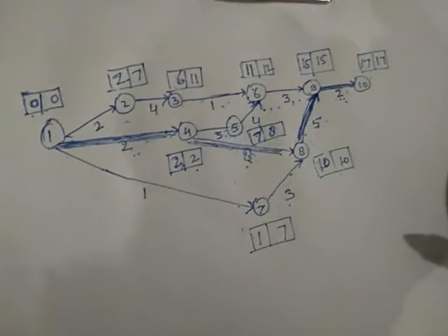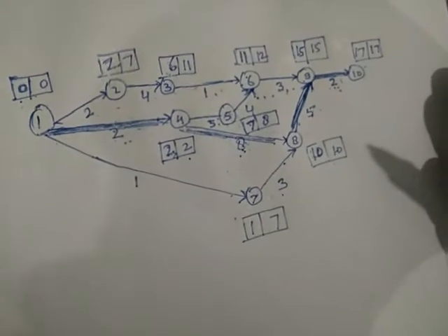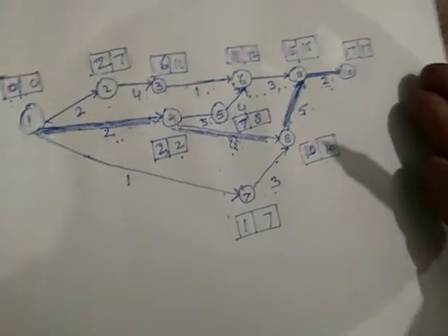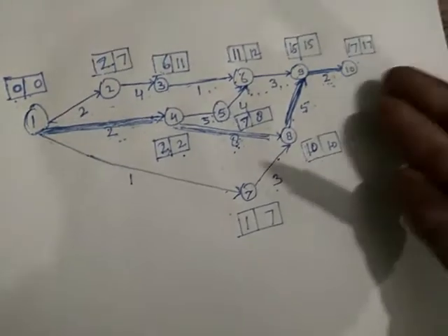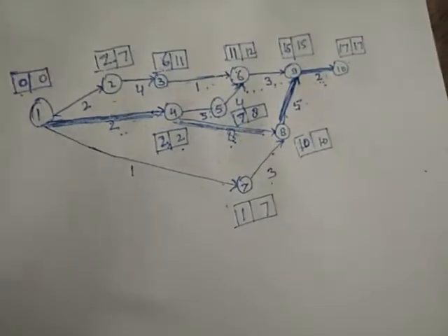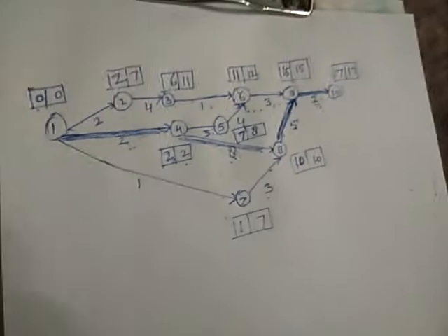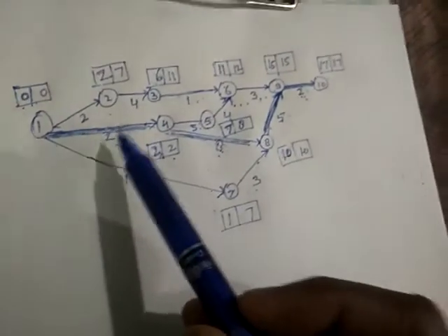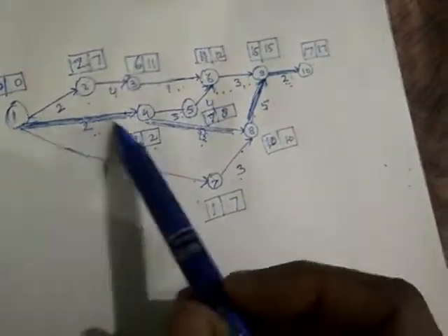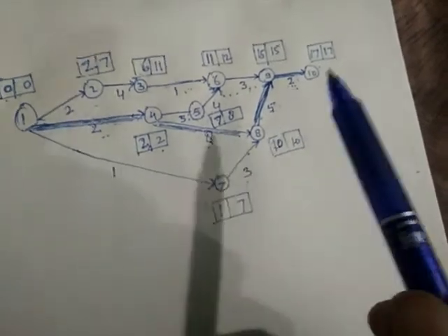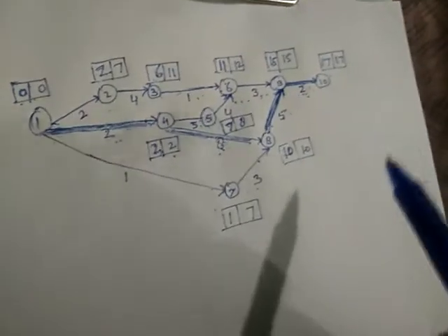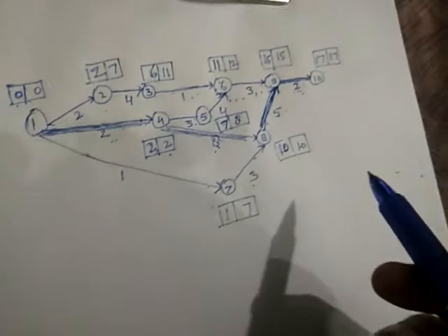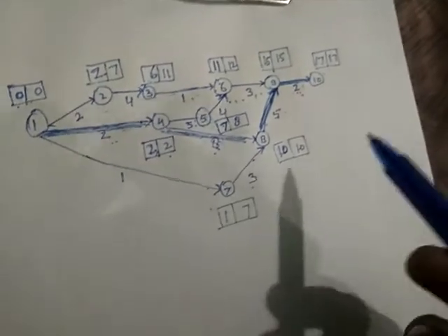Now further you know how to proceed for the calculation of total float, for making that table. Now you can simplify your calculation. You can directly write the total float for each activity lying on the critical path as 0. Once your total float is 0, then free float and independent float will also be 0. In this way you can minimize your calculation.